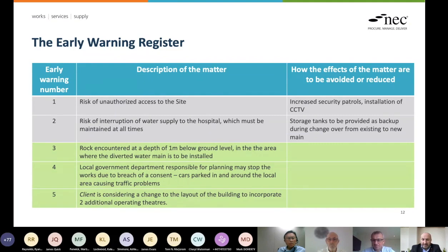Yeah, I would just add to that that people do sometimes get a little bit concerned about whether they are going to get paid for this, particularly from a contractor's perspective. People are being dragged into meetings, they're not doing the day job, and we're not being paid for this under option A and B, as you say. Under C and D they're getting paid, but it may not be reflected in changes to the target. But hopefully you've seen from this session that the idea is to bring benefits to all of those affected.